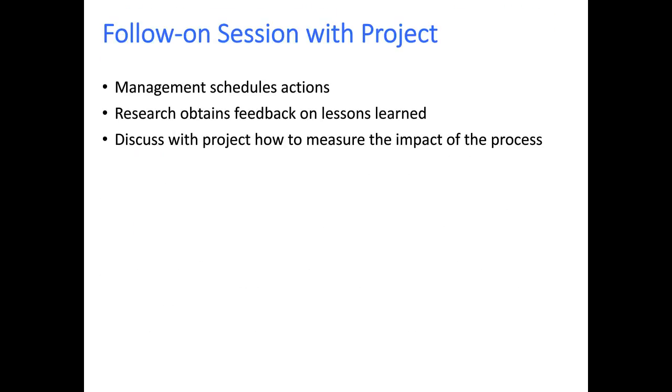So obviously, once these things are done, and as I briefly mentioned, these are done as a part of the release strategy, as part of one of the quality gates for release to come out. Typically, these actions, for the most part, have to be scheduled for the next release unless there's some real sense of urgency.